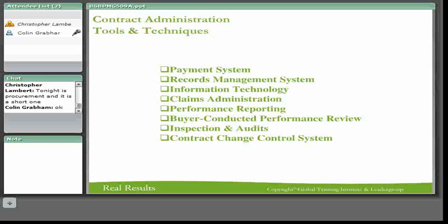Actually, I saw a very good thing on that one the other day. All the contractors had to do every day was report the distance they dug and how much piping they dug in a day, because the project manager wanted to know. And because he had such a good history and a database of how things are constructed, he knew exactly where they were and how far they should have been.